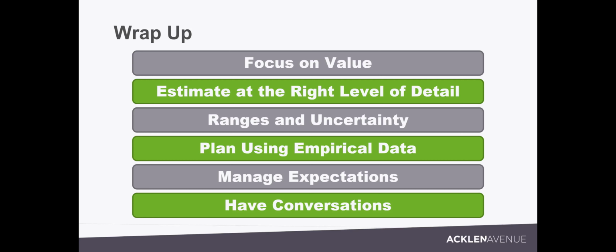Then when we get into estimating, when I talk to my teams and we're doing estimates, the conversation is actually the more important thing. And the details, getting them out of being so narrowly focused and looking at the top. Tell me about boundaries, integrations. What's your uncertainty? What are your assumptions? Those conversations are critical. And then once I get into it, every 2 weeks, looking at the data, seeing what the data tells us, putting that into our plan, seeing how our plan is now affected, and having a conversation about what that means for setting the expectation of what value is going to be delivered in the future.